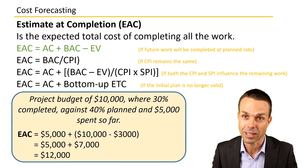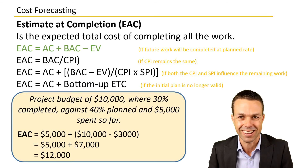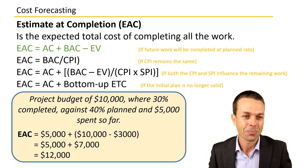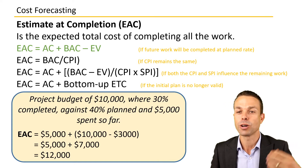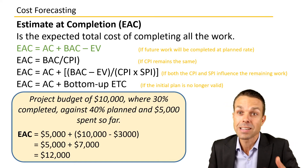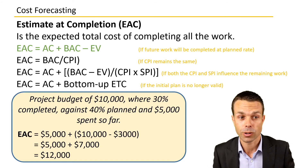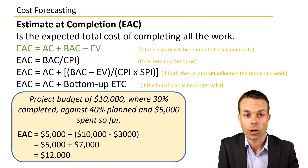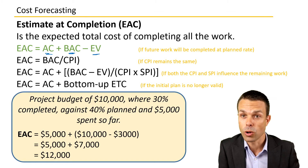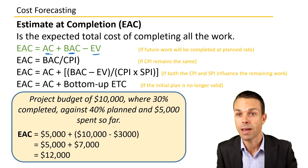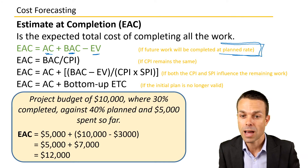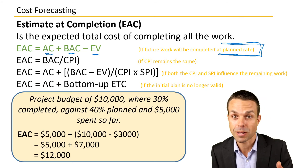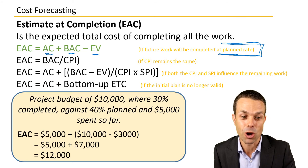Let's jump into Estimate at Completion and the many different ways you can calculate it. The EAC is the total expected cost of completing all the work. The first formula is: actual cost plus budget at completion minus earned value (AC + BAC − EV). This is used when everything is expected to be completed at the planned rate — no matter what's happened, we still expect things to proceed as originally planned.